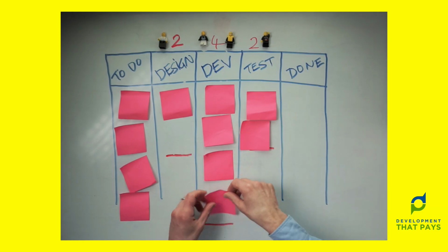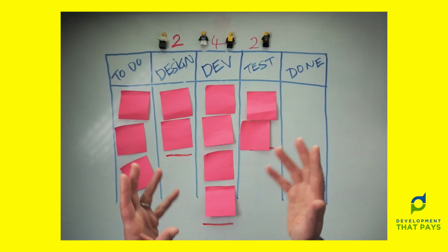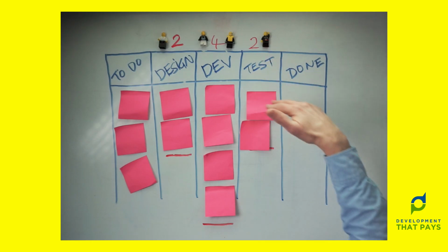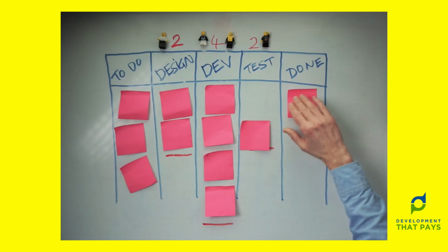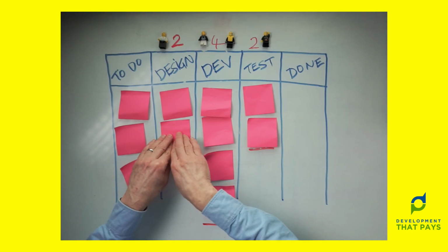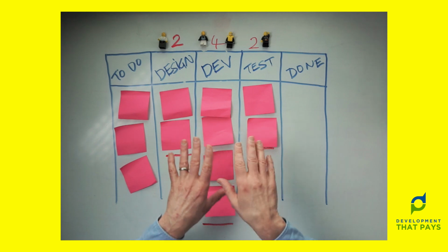There's also a really practical reason that we start at the top right. If I, again, load this board up, put everything at its work in progress limit, as we saw before, these are the only cards that can move. If we start at the top during our daily stand-up and we find this one can move, well, we've opened things up. If I'd started to move cards starting here, things would have got messy very, very quickly.